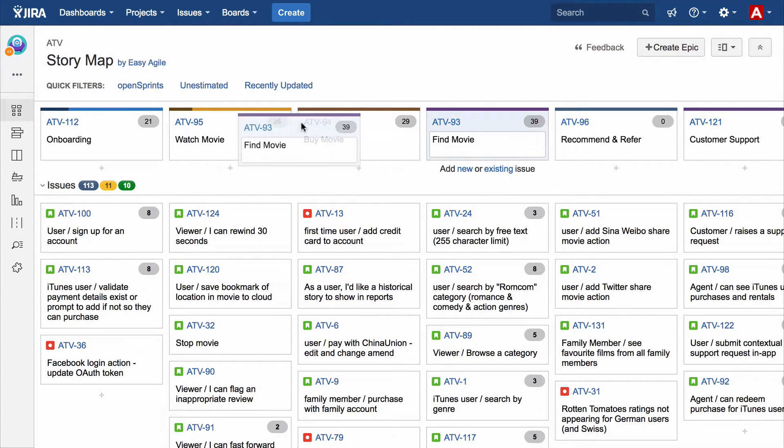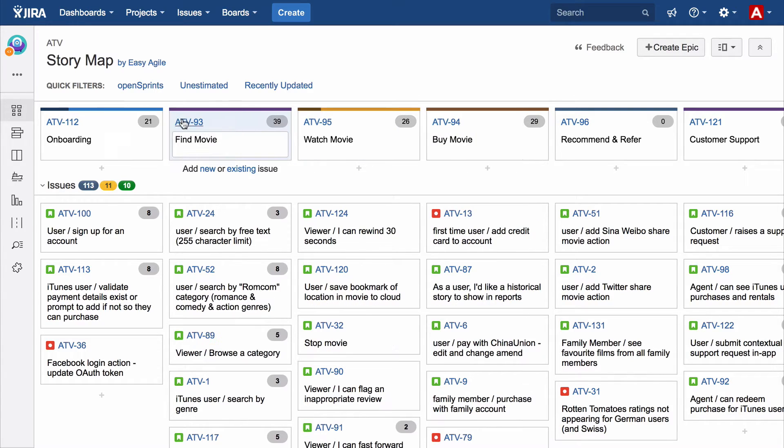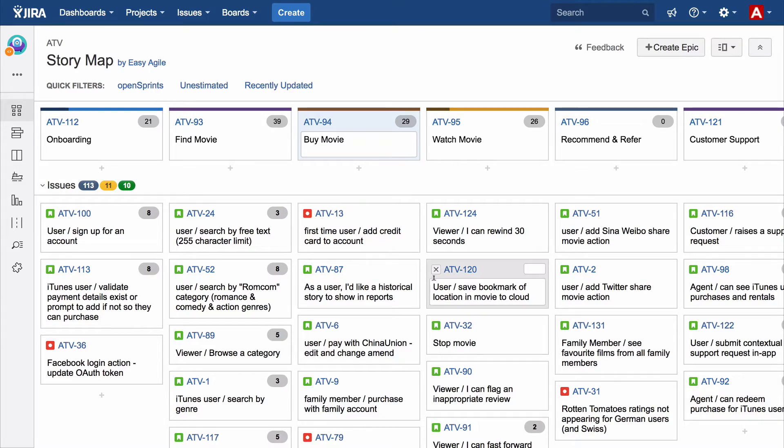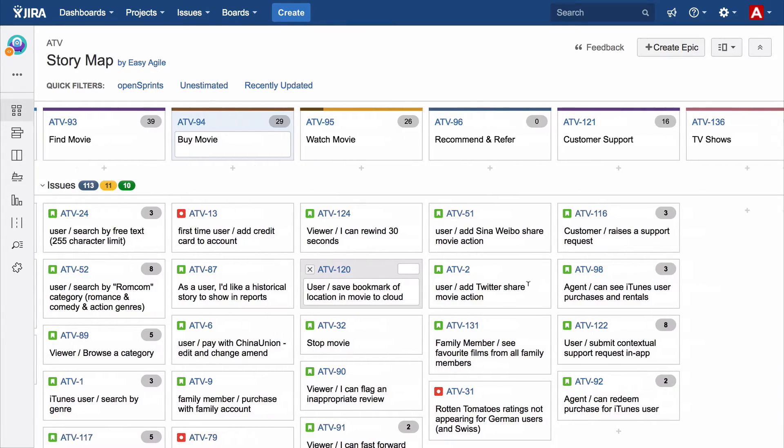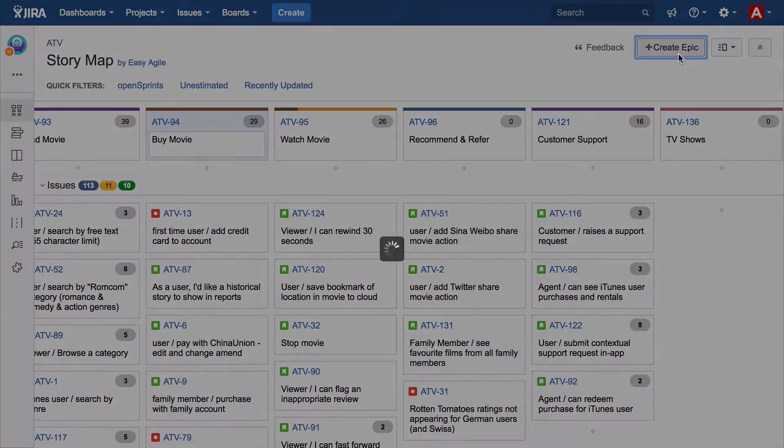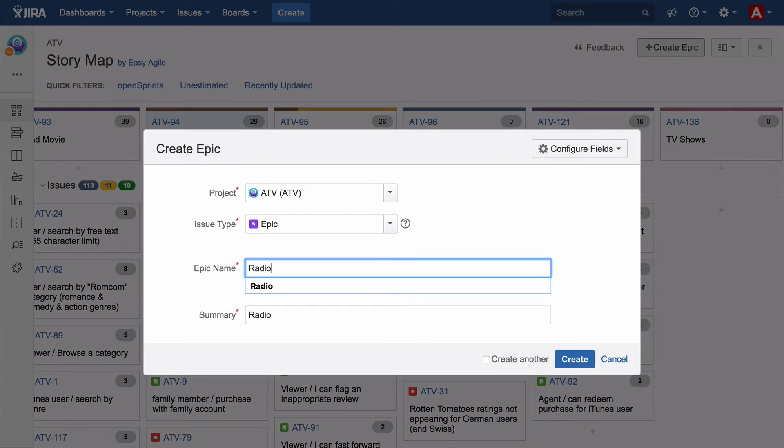Across the top of this story map we have six activities represented by epics. User activities generally appear in chronological order, so the team often drags the epic to a new place and the linked stories follow too.